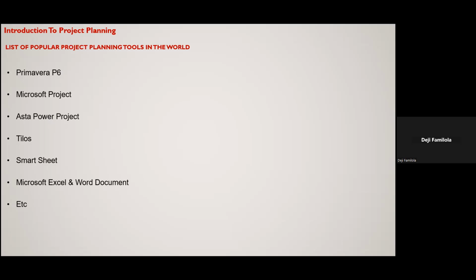They will require them to submit a schedule, and what they do is they have a master schedule in Primavera. Sometimes they call it IMS, Integrated Master Schedule. So they collect all these plans, all these schedules from different contractors they've employed, and integrate them into their master schedule, so that they can interrogate and make sure what they've planned is not moving to the right.